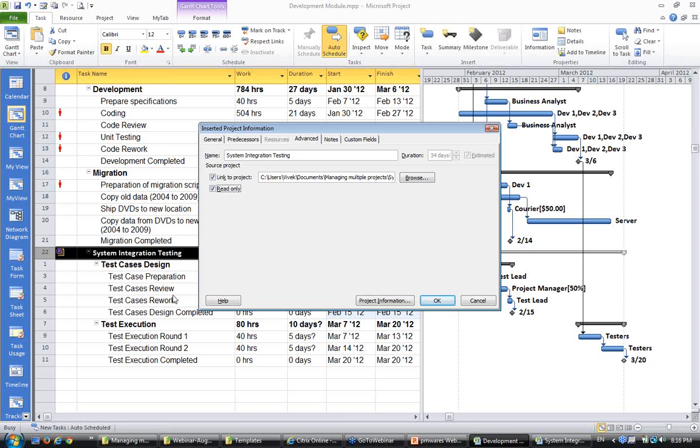My changes here will not change the other project plan. This way I would maintain the sanctity of the project plan. Because it is being handled by the other project, I only give suggestions, I do not go and make changes. And making it read only will help me prevent changing it by mistake.